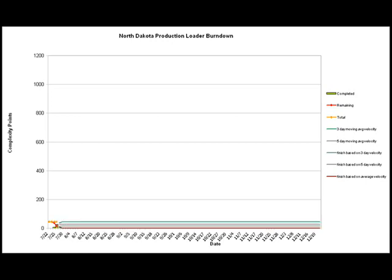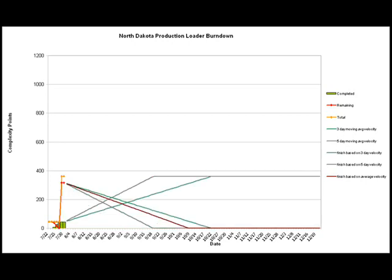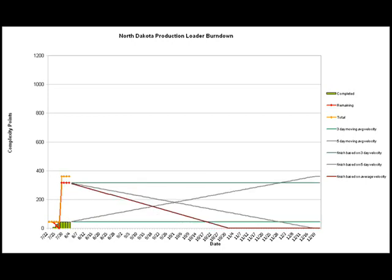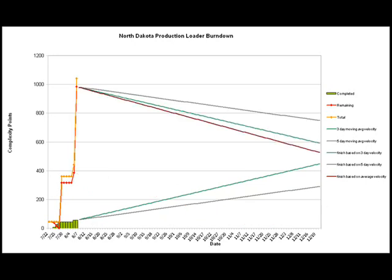While work progressed, we also knew that we had not done enough estimating of the remaining stories. During the next two weeks, we had two more release planning meetings where we estimated the remaining stories. At the end of the two weeks, we had estimated all the stories we had created, and we also felt that we had created most of the stories we were going to need. At this time, we could do our first estimate of a potential release date. The team's velocity was fairly low and there was a great deal of work to be done, so the projected release date was very far in the future — off the chart, in fact.